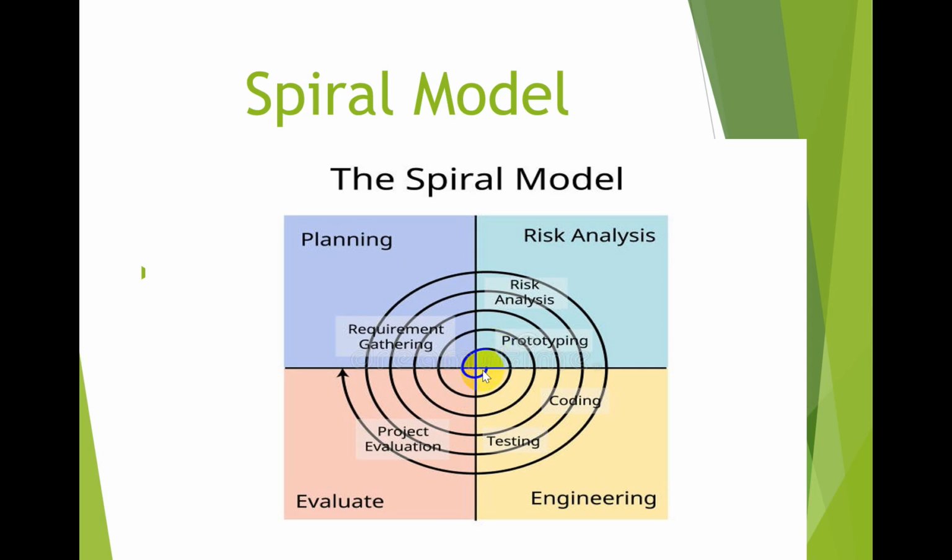One cycle is one release. So whatever information we got at the initial moment of the release, we choose for that particular release. Once requirement gathering is completed and we go for the design phase, coding phase, or testing phase, after that, if any additional requirement comes, we keep it as it is for the next cycle.